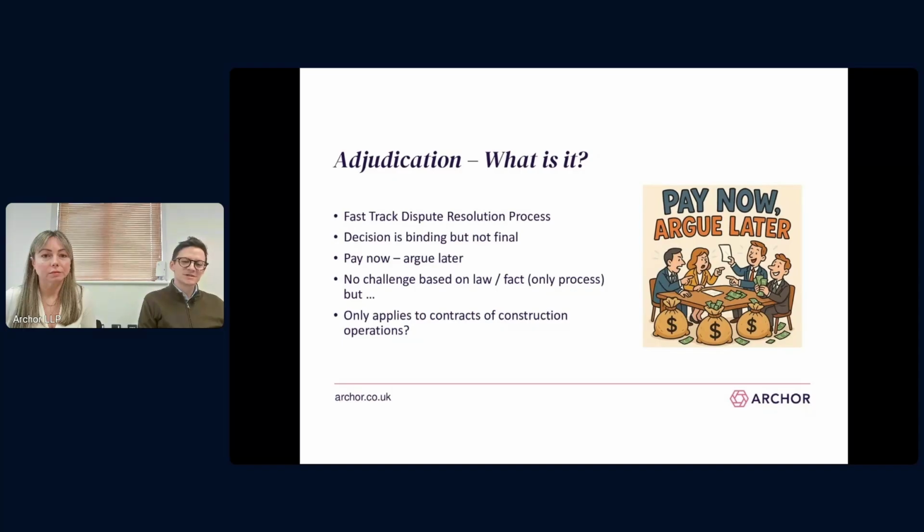Adjudication is driven by the policy underlying the Construction Act, which is pay now and argue later. And I think that's been brought out in a lot of the recent case law about notified sums or smash and grab adjudications, where you effectively pay the notified sum and adjudicate on the true value afterwards. That's really the whole ethos behind the Construction Act. Adjudication, or statutory adjudication, only applies to construction contracts, which are contracts for construction operations, and we'll come on to that shortly.